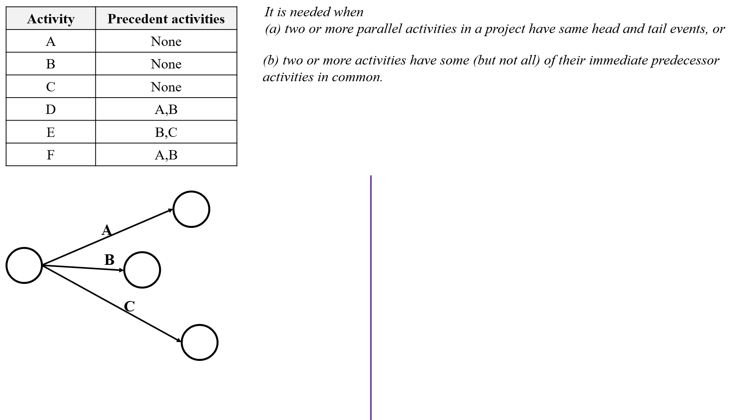Next activity D, which has immediate predecessor activities A and B. So draw the activity D like this. But this indicates the activity D will start after completion of activity A only.